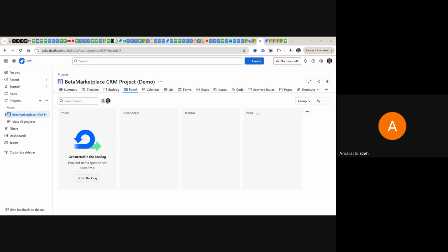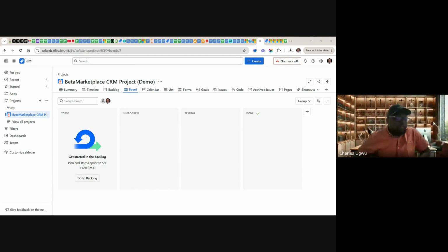Okay. That answers it. Thank you. That is the definition of done. We agree that all these things need to be tested, and all the acceptance criteria met, and that is it. If it is not meeting the acceptance criteria, we are not taking it. That is definition of done.